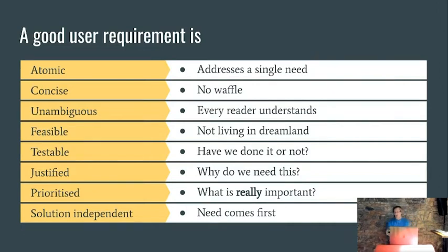And believe it or not, I had a case in the past where a significant amount of rework was required because of the positioning of a comma in a particular long sentence. It really is important that you have small blocks of requirement when you come to implement them to make sure everyone understands. They need to be concise. There shouldn't be lots of waffle. You shouldn't repeat things. And yes, this does mean that they take time and effort to write. They're not just notes from a whiteboard.